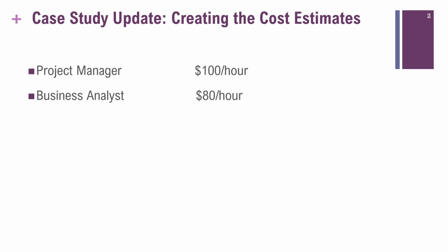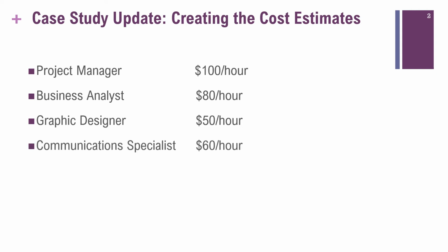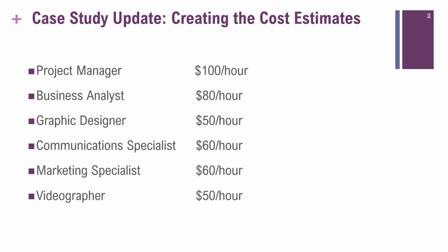While other team members have not yet been assigned to the project, based on the work involved, Sophie knows that she will need the following. Graphic designer, $50 per hour. Communication specialist, $60 per hour. Marketing specialist, $60 per hour. Videographer, $50 per hour.